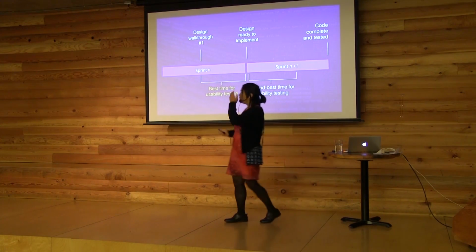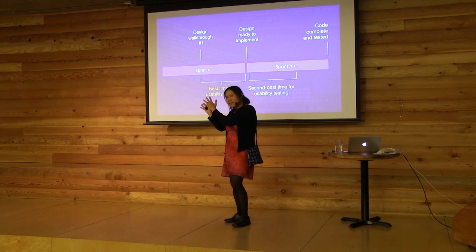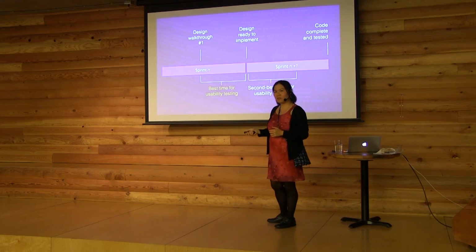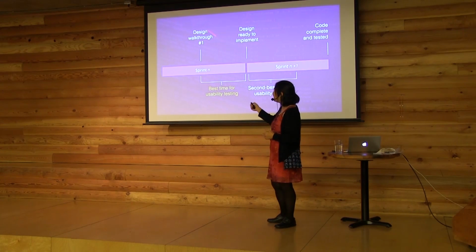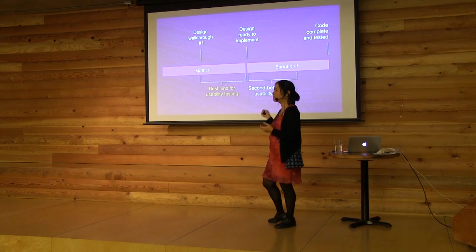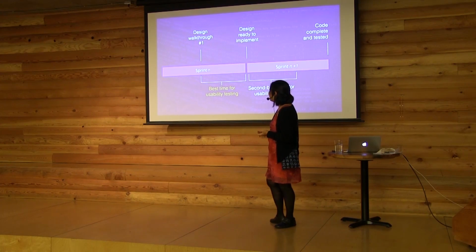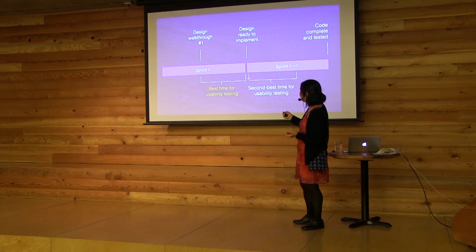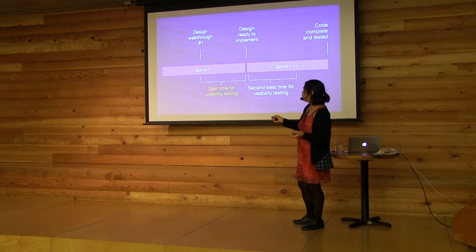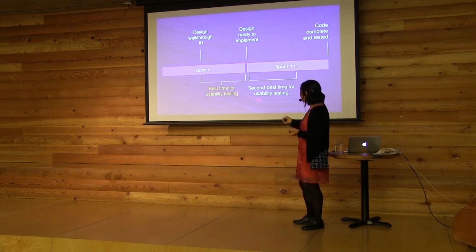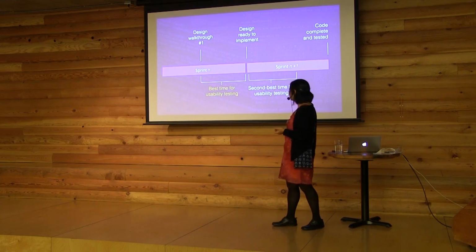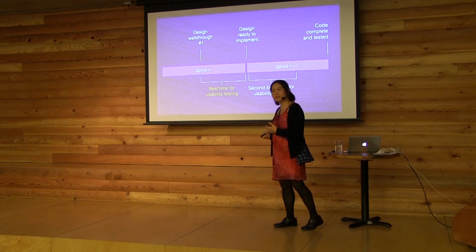The best golden time for usability testing is between the time you get the design out to the rest of your team and when you hand it off to developers. I always want to have the team look at it first, because then they can find things like feasibility problems and really obvious things. But this is also a good time, especially if you're dealing with something highly interactive that doesn't work well on paper. Does that make sense?